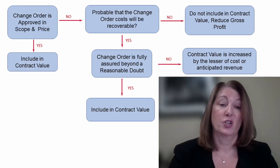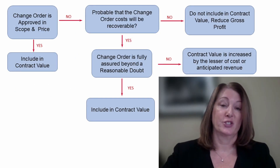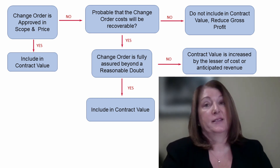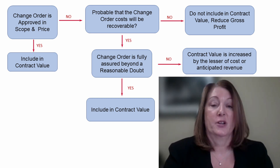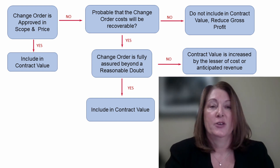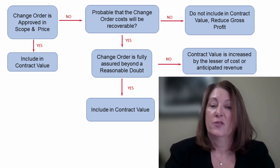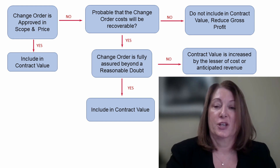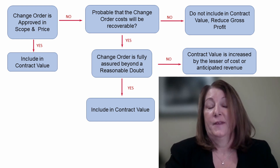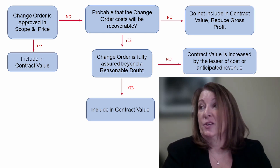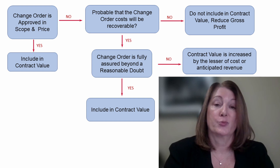Our next step is to determine what value we're going to use to account for this change order. As you'll see in the left-hand corner of the presentation, the first thing you're going to ask is: has the change order scope and price been agreed upon with your customer? If so, your job is simple — you're going to increase your contract value for the change order amount, forecast the estimated cost of this change order, and this will affect your total gross profit on the job. You will recognize gross profit to date based on your percentage of completion calculation.